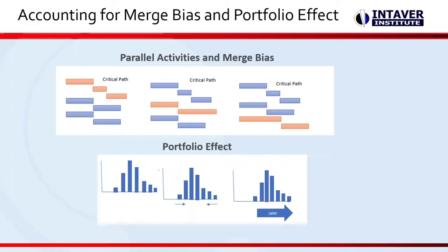It only does a single path. It's not taking into account risk and uncertainties, and will always give you a single critical path. And these tasks that are on or near the critical path are referred to as crucial tasks. These are the tasks that we need to focus on during our project execution.